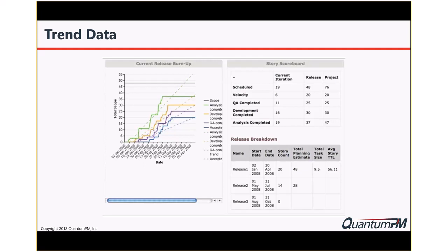It has a variety of interesting things in it. It's telling you things like velocity, which is a term used in agile to get a flavor for how many components can be done in any particular sprint cycle. So if a sprint is 1 week, how many things get done? Maybe you set them for 2 weeks. It doesn't matter. The idea is that you get a pattern set so that you can predict your future a bit better. That's what the trending is about.